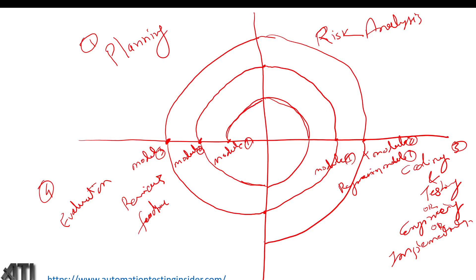This is spiral model — it is the combination of iteration and incremental development. Iteration means repeatable things — we keep repeating the same four phases: planning, risk analysis, coding and testing, and evaluation. Incremental means we are adding module one with module two and module three, progressively building the software. That is the spiral model.